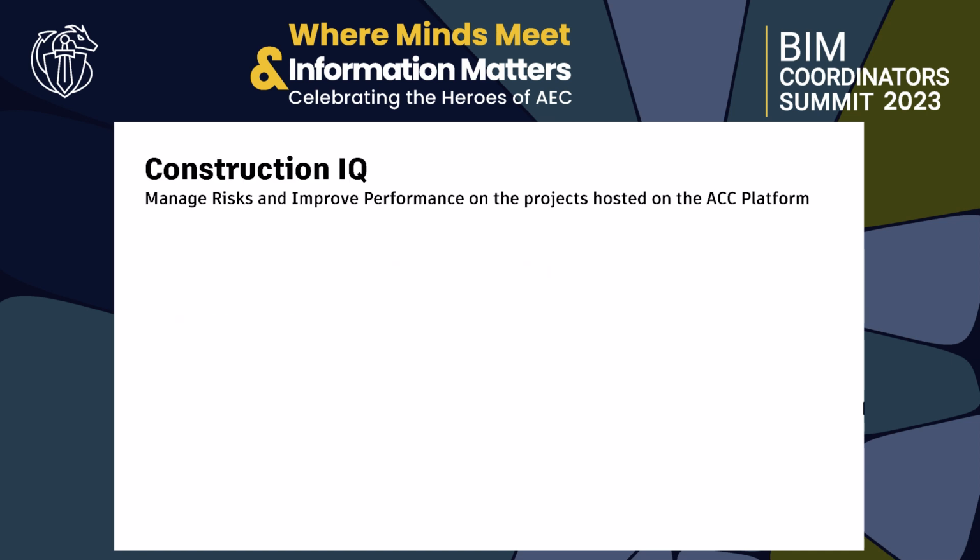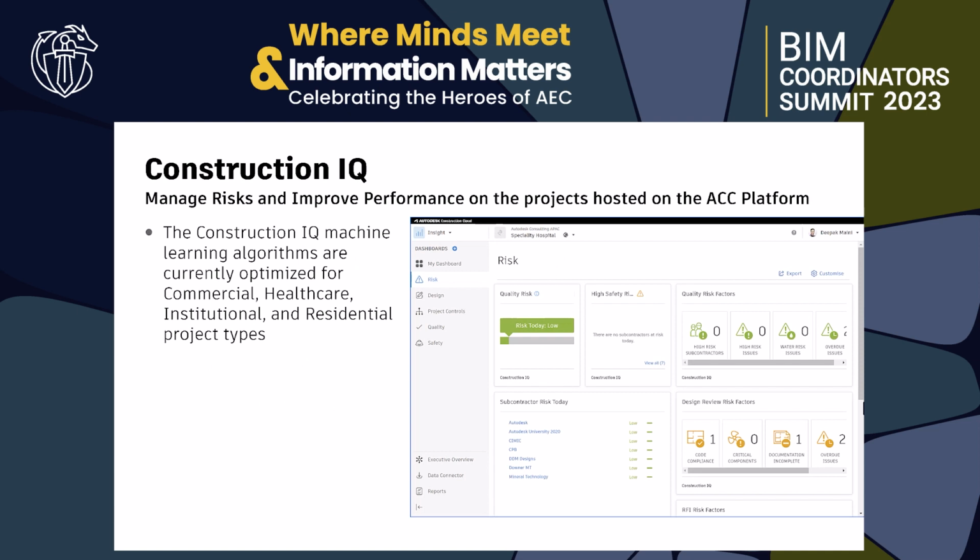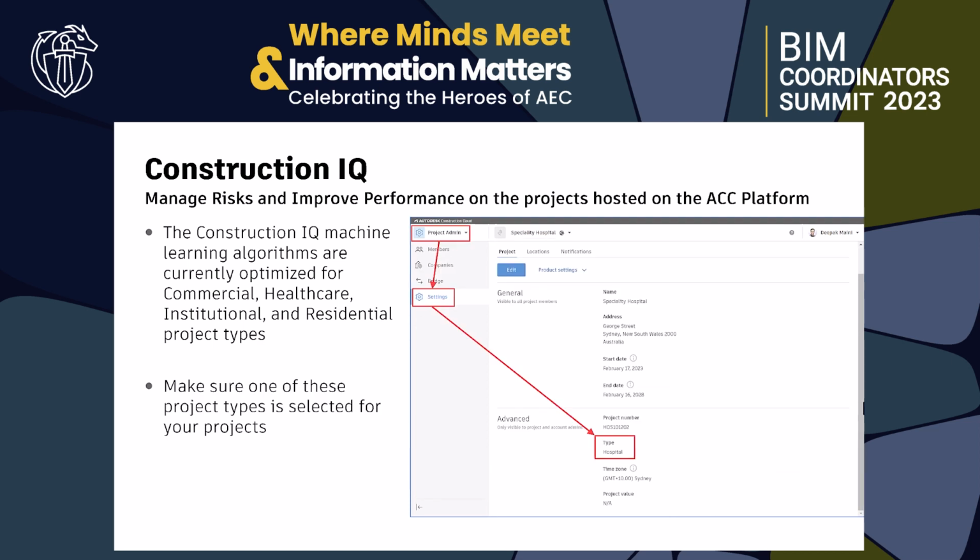Now, one thing that you need to remember is that Construction IQ is currently only optimized for commercial, healthcare, institutional, and residential project types. So please make sure when you set up your projects on Autodesk Construction Cloud, it is one of these project types, or you will not have Construction IQ based analytics on your project.